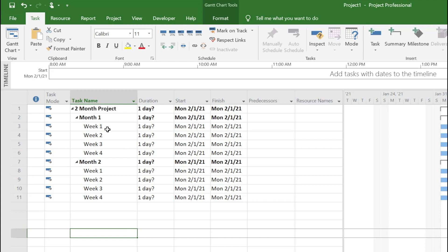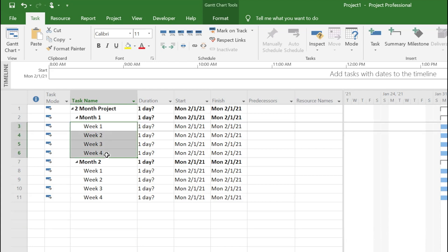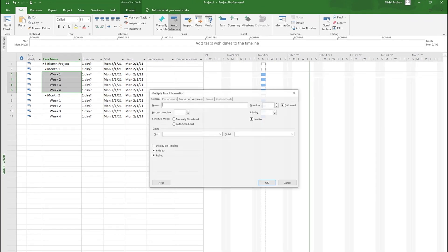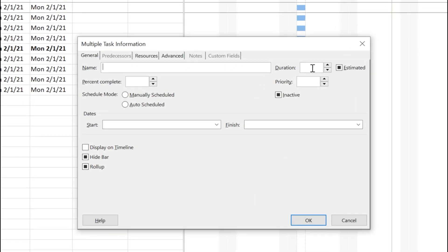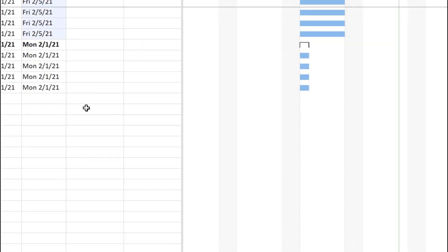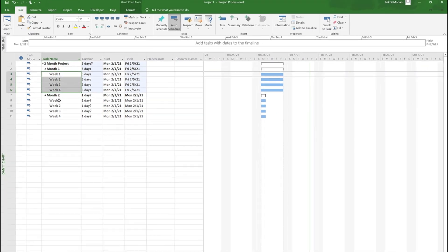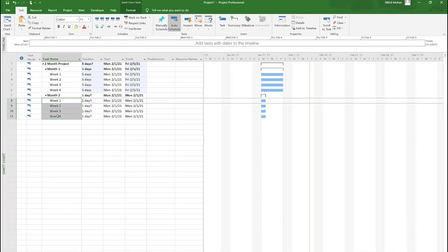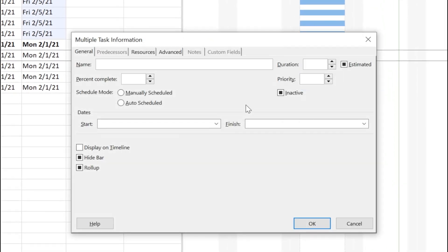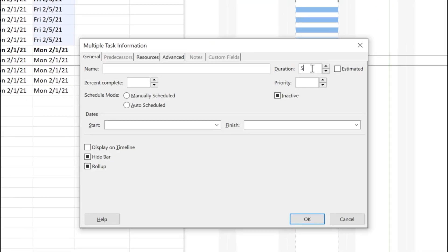Let's make all of this five days. I'm gonna select all, go to information on the ribbon and say duration is five. We'll do that for the month two activities as well.